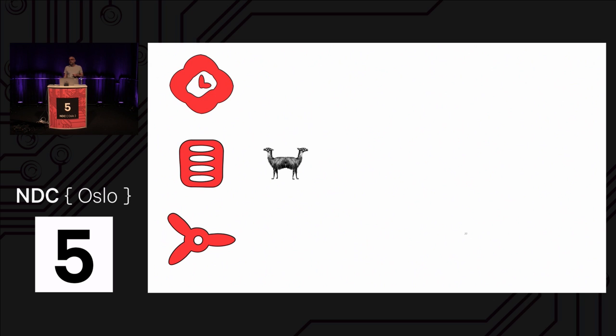The first is the top one, so this is scheduling, having to wait on someone. I mentioned this with the architecture review boards. You have to wait for 4 weeks to get your change approved before you can do something, right? Release trains are another one of these. We have to wait for the next release cycle to come around, because it's on a scheduled basis.